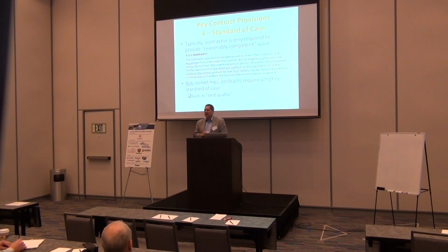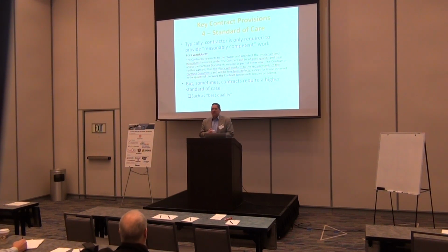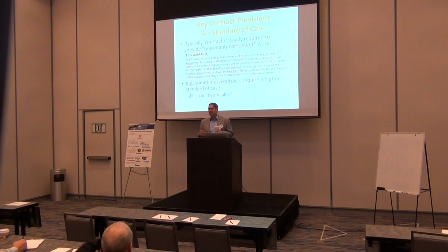Sometimes, the contracts will have things like best quality. Okay, so that means you do better than 99 out of 100, but one person beat you, then you didn't do best quality. I mean, it's something that I would look at as a lawyer and say, okay, that's something that you could fight later on. So it's an invitation to a fight. So I would look and see whether or not there's something in there that talks about your standard of performance has to be better than the ordinary contract. Okay, that's just something I would look out for. Any questions on that?